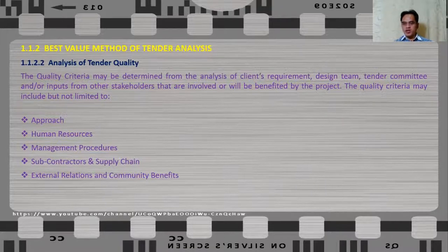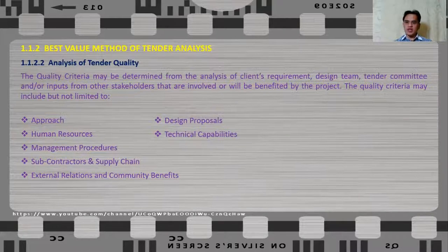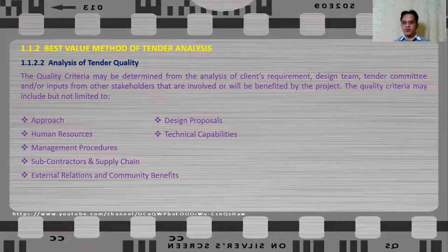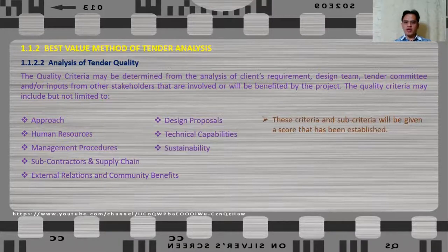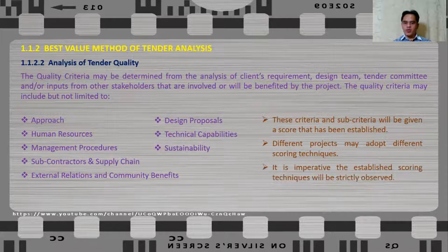Community benefits are particularly important for government projects. Other quality criteria include design proposals in the case of a design and build procurement route, technical capabilities — whether the company has enough equipment or has carried out projects of similar magnitude before — and sustainability. These criteria and sub-criteria will be given a score, and different projects may adopt different scoring techniques. It is imperative that the established scoring technique is observed strictly.